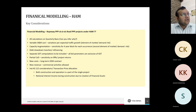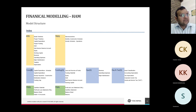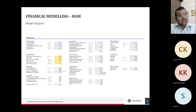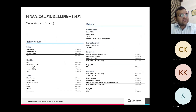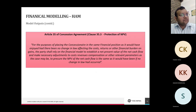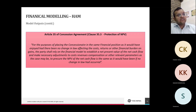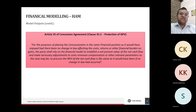These snapshots show what a ropeway PPP financial model looks like — the recording will be made available to all registered participants. The financial model is important because Article 35 of the concession agreement deals with protection of NPV in case of change in law. If the authority introduces any change in law, the financial model is the tool used to ensure that reimbursement to the private sector restores the original NPV. This makes a robust, authority-submitted financial model a necessity for these projects.